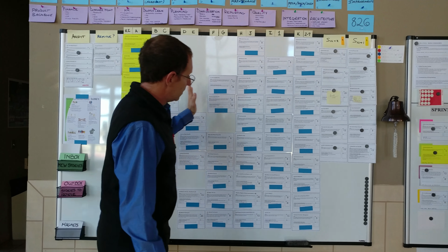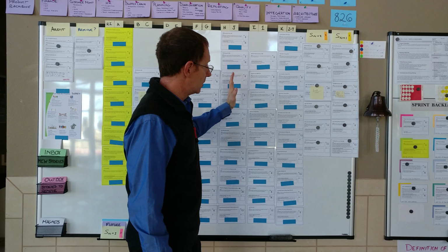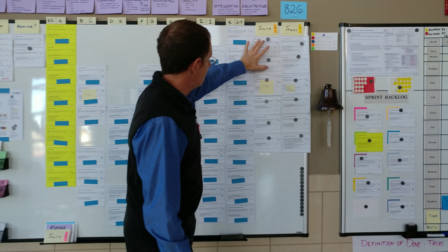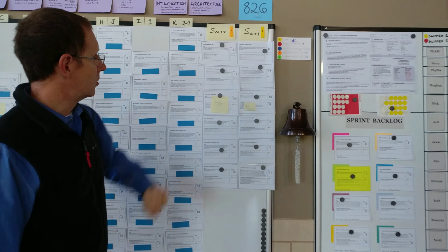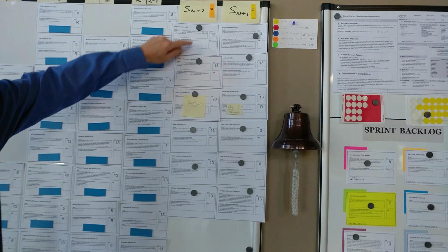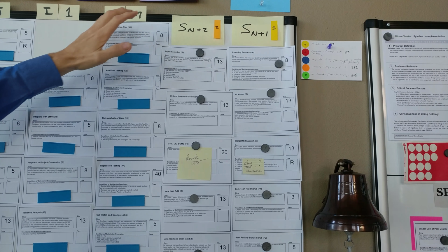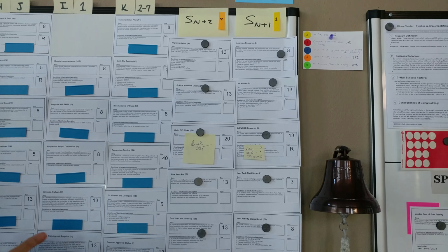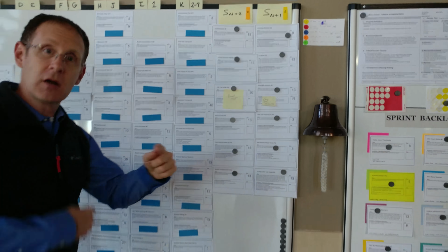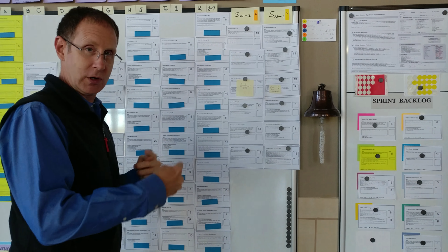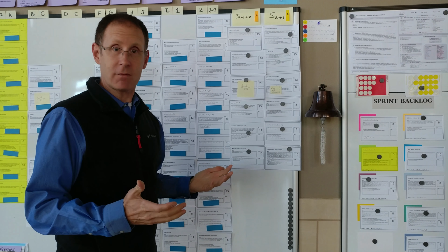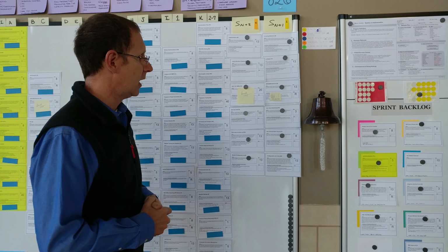Now, as we start to get ready to do the work, we slide in this direction. This is the staging area that the product owners use to identify what's going to be done in the next sprint and the sprint after that. So this is where we're getting ready to have the team start to pull work into their Agile Scrum cycle. This is a Scrum-based team, which is one of several recipes you can choose to implement Agile.